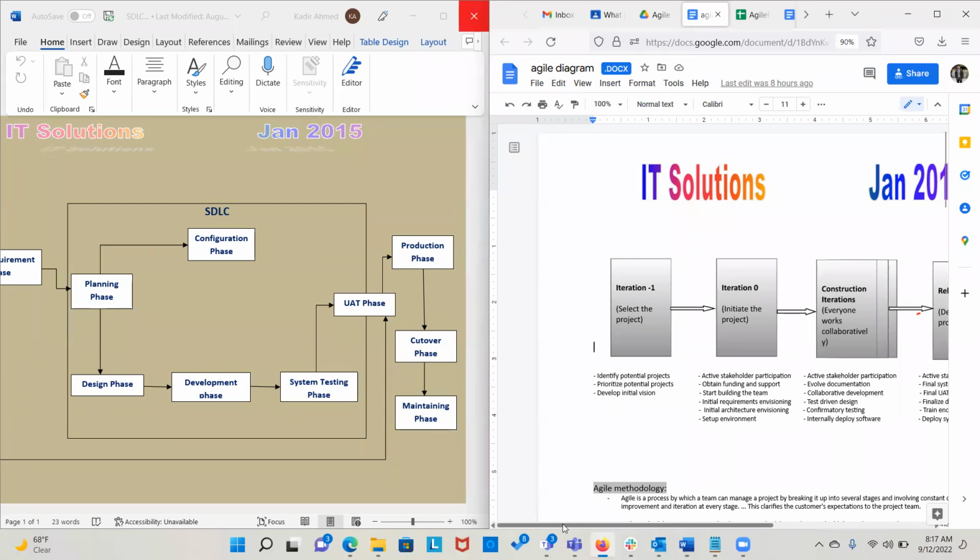But the good thing is, if you're working within the time frame and the changes can be done within that time frame, you do it. And like I said, 2 weeks is the time frame, maximum 2 weeks. It doesn't go more than 2 weeks. If it's more than 2 weeks, that is not really pure Agile. You could do 3 weeks, but I haven't heard of anyone doing a 3-week time frame in Agile. So you just select the workload that you can complete within the 2 weeks, and you go on with this.